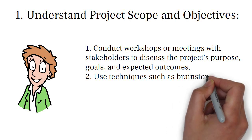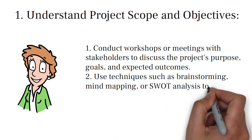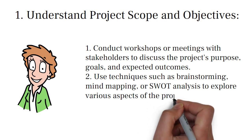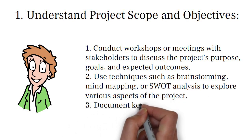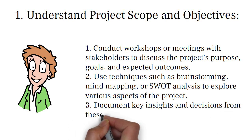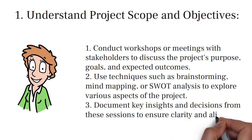After doing all these, you must document the key insights and decisions from these sessions to ensure clarity and alignment. For example, you should hold a kickoff meeting with the stakeholders to discuss the objectives of the new platform — say a new e-commerce platform or application — and understand that the business wants to increase sales by 20 percent within the first year. So you must understand the project's purpose, goals, and expected outcomes.